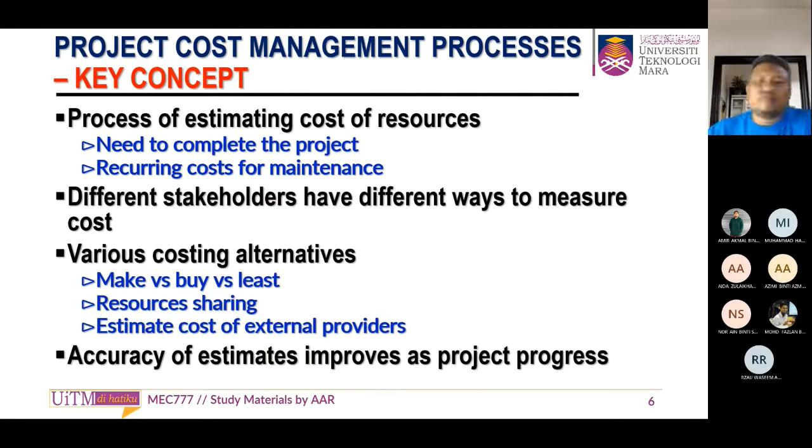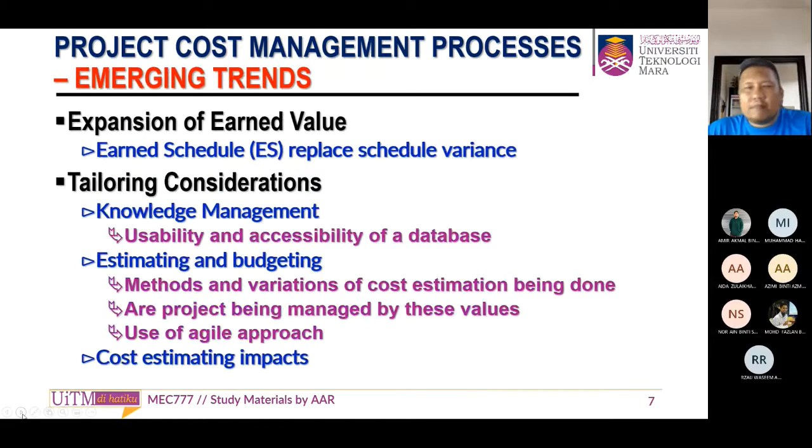If we have experience, normally we are not doing reviews many times. Before the project starts, we have the value management process, VM. In value management, we already know the total cost, what is a need and what is just a wish. So we try to reduce as much as we can the wish list or wish items.